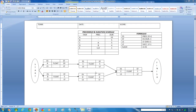You'll notice each arrowhead goes to its respective task. Each task already has its task time within this node. You'll notice that task A and B both do not have a precedent, so once the project is initiated or started, both of those tasks can occur at once.